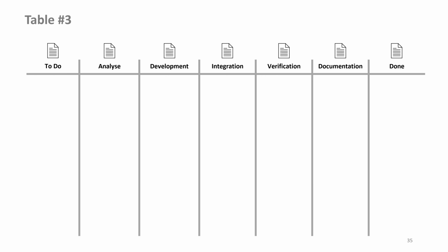Then we have points from when we can commit to something or where the analysis and documentation is done by another team. From the green point above, we as a team say we are developing the whole thing, and from the blue point above, we hand over to the following team. The green point is called a commitment point, and the blue a delivery point.